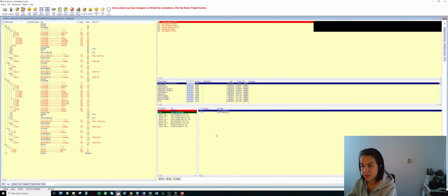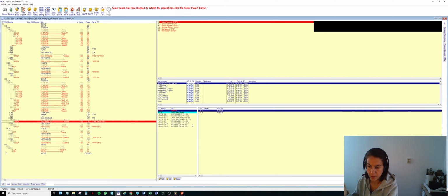Okay. So you can note that ECOS already realized that there was an overlap between these branches that you've assigned at the beginning as budgetary, and now the fact that they have a real ITT associated to it. So it's also a good way for you to follow your contractual files and see where you stand.